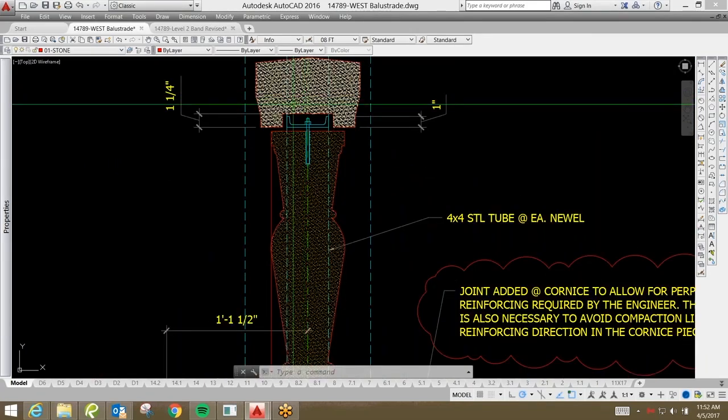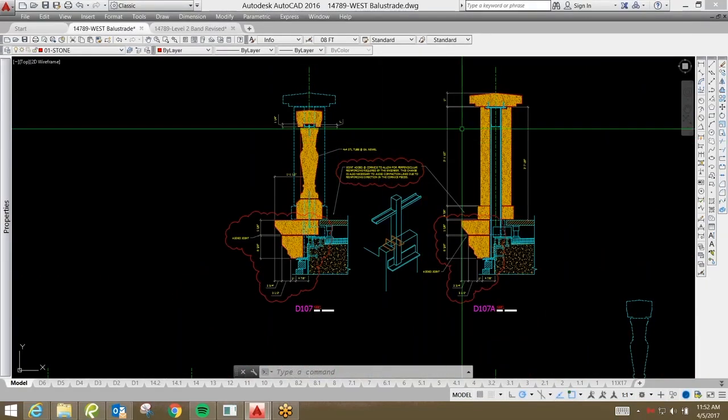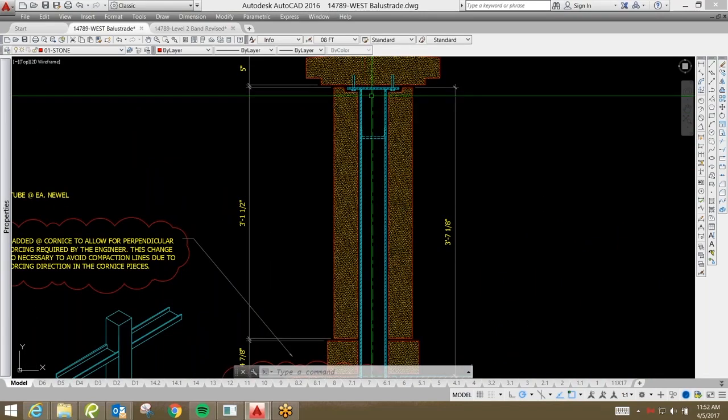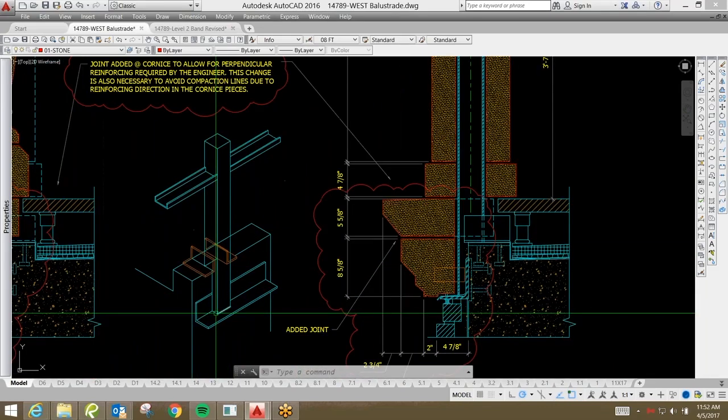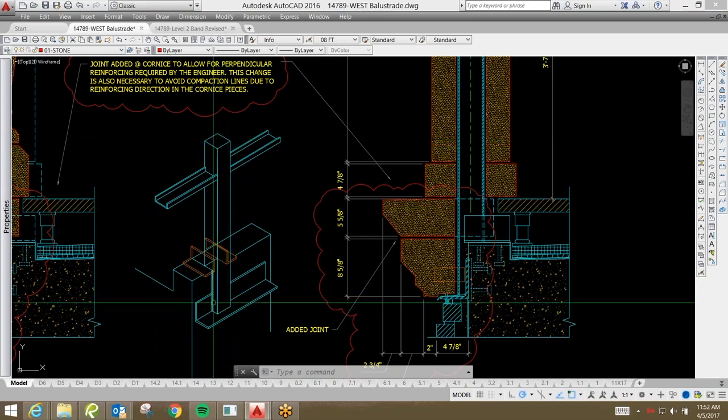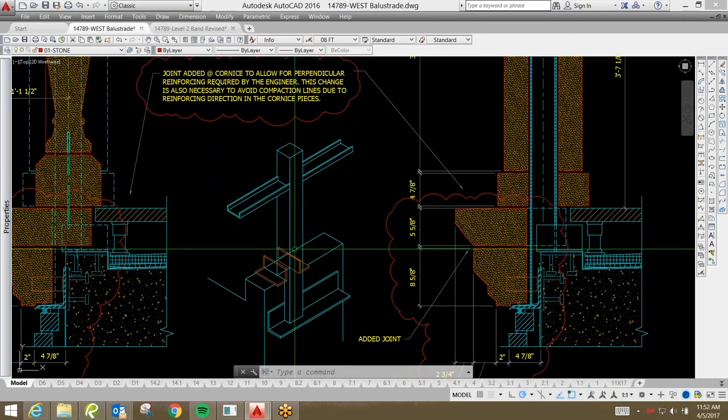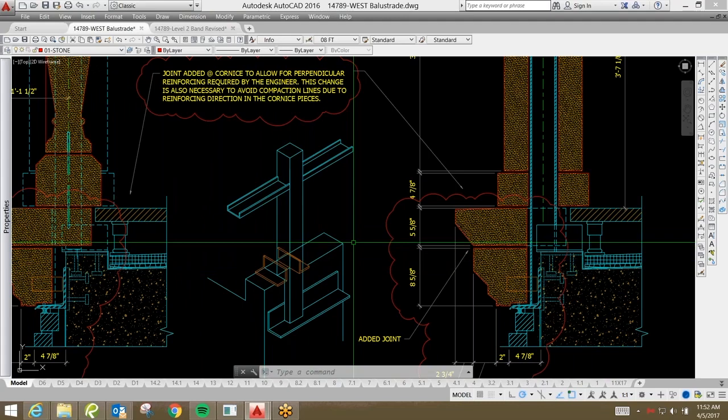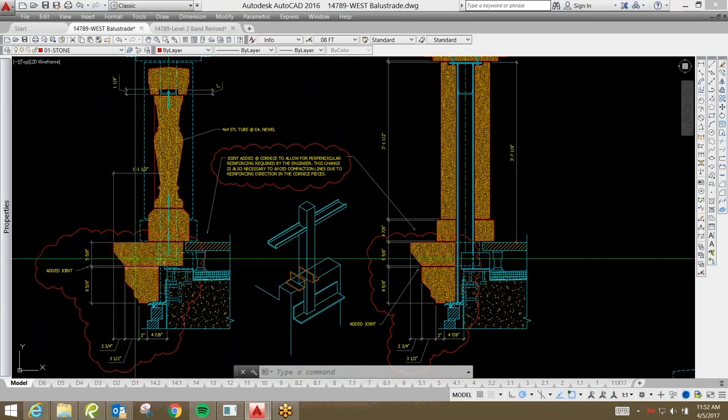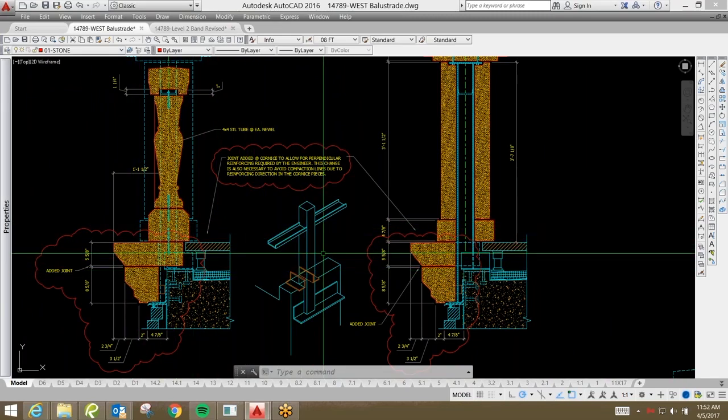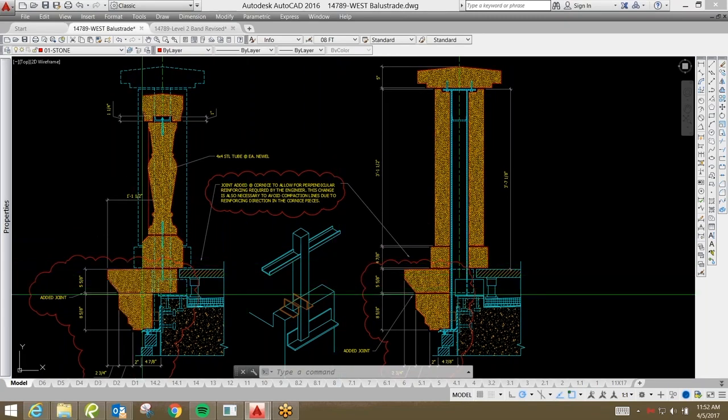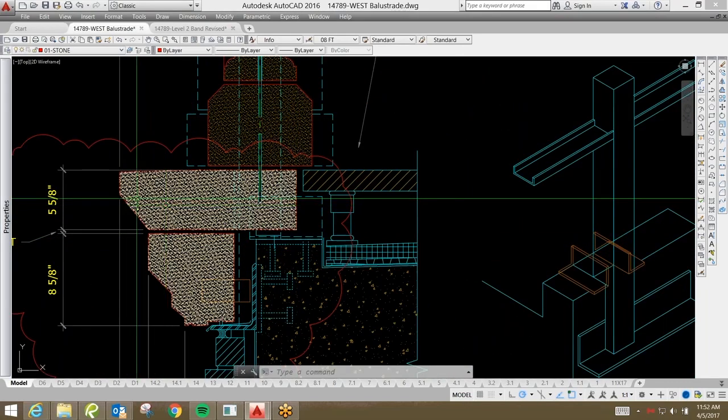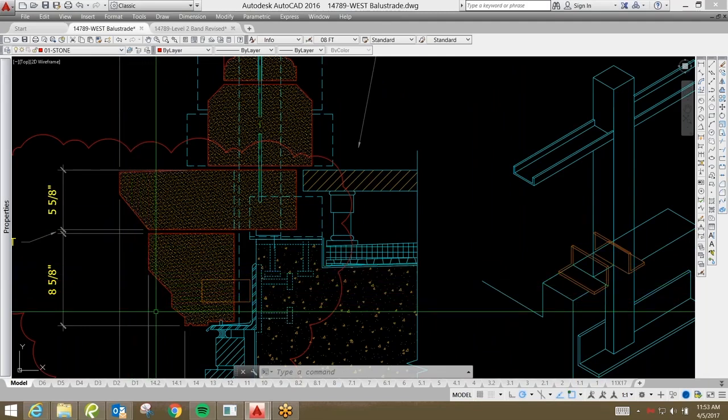Another change to this balustrade system was that it's got to be structural. So these have a steel channel that spans between each Newell Pier with a steel post concealed inside the Newell Pier. Here you can see a little isometric with the four by four steel post with steel angles. This is just an example of how we work directly with the structural engineer to resolve some of the structural issues and how to get the cast stone to basically adapt to the structural aspects, as well as how we work out the structural issues and how that relates to the profiles and how we're able to manufacture those.